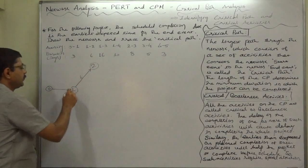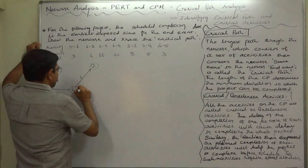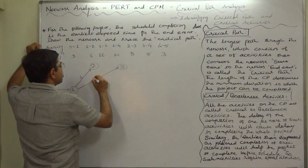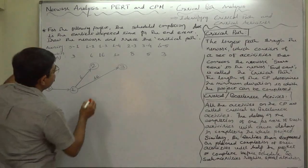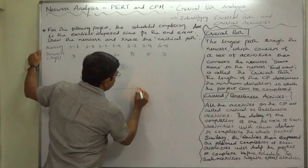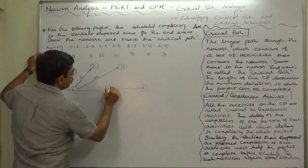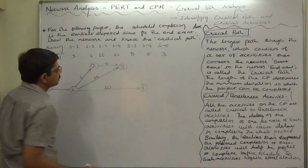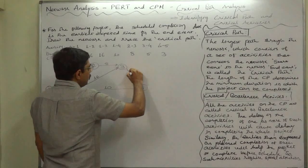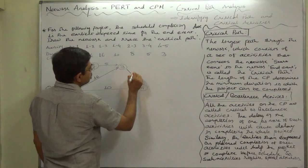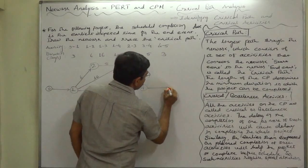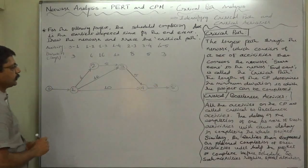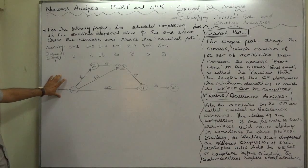Activity between node 1 and 2 will take 6 days. Activity between node 1 and 3 will take 16 days. Activity between node 1 and 4 will take 10 days. Activity between node 2 and 3 will take 8 days. Activity between node 3 and 4 is going to take 5 days. The last activity between node 4 and 5 will take 3 days. This is the PERT chart or network logic for this particular project.